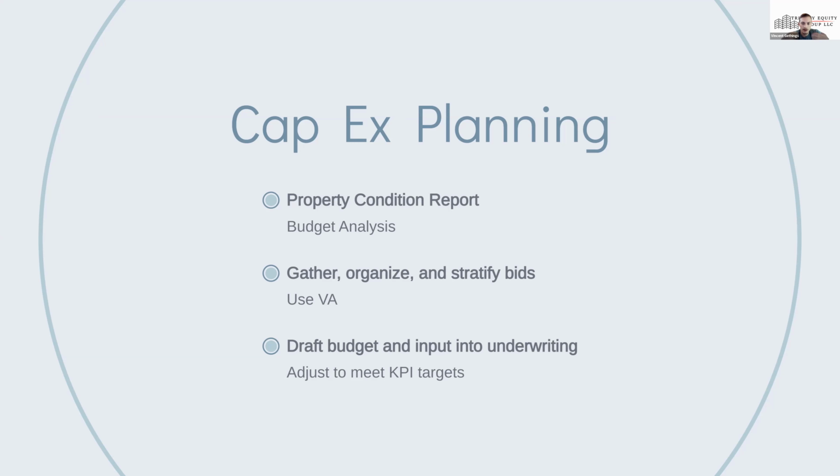Once we start getting a lot of them in, we'll start organizing them, putting them on an Excel spreadsheet and lining them up and testing them against each other, this HVAC contractor versus that one, to see who is the best value for the price. Maybe go back and try to trade them down a little bit on some of the line items. But our average is about 2 to 3